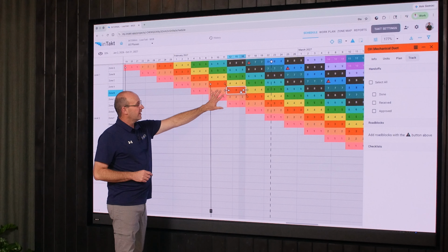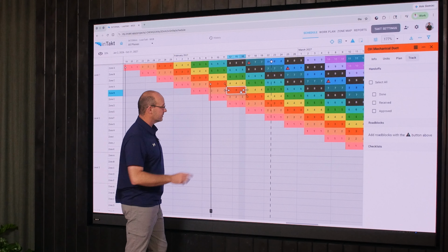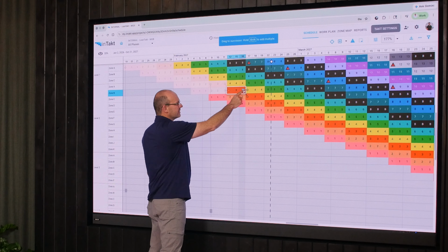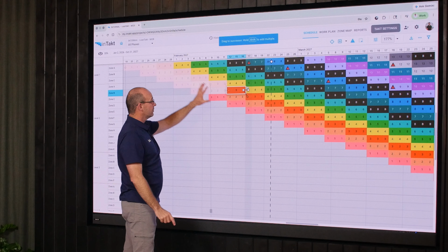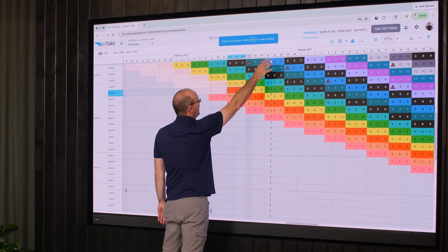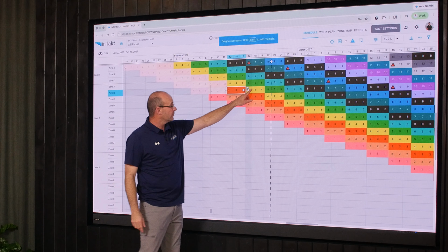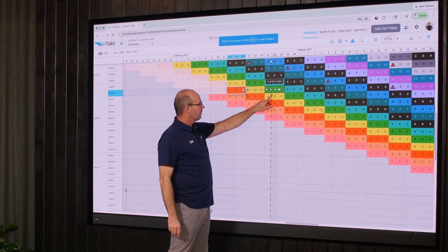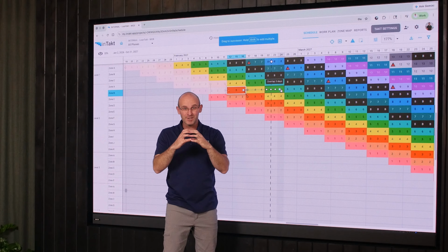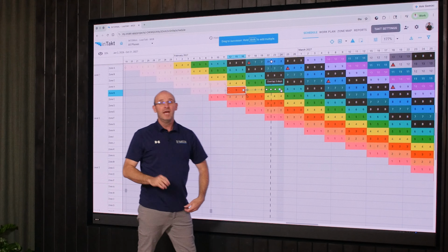Now this is all very easy and automatic. We wanted to replicate the easiest software applications. So Danny will take his cursor and left click and click on this node right here, and you'll see it goes into a mode for linking. And it says drag to your successor. And if you want to add multiple, you hold shift. So he's going to pull this out here to another activity, and watch what happens. For each single day, a little node comes up. So if you're like, I don't want to tie to the front or the end, I want to tie somewhere in between, you can do that.